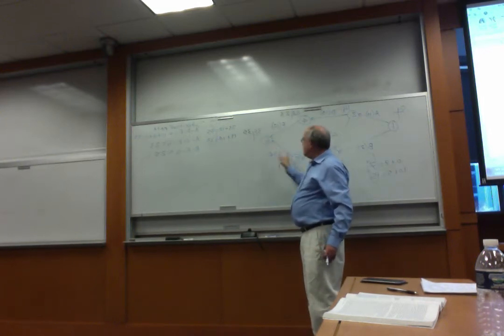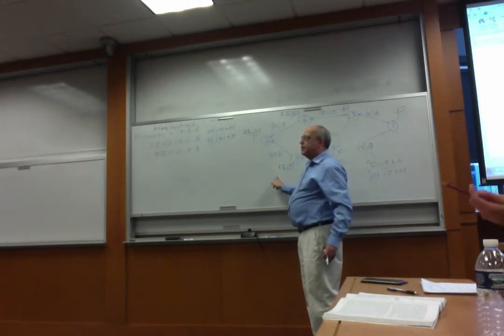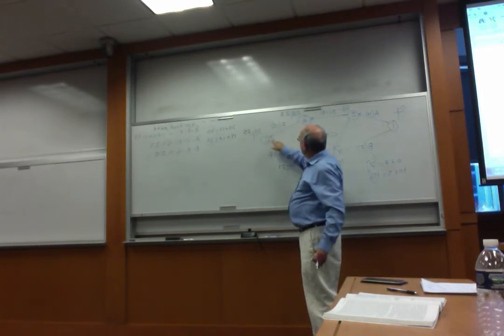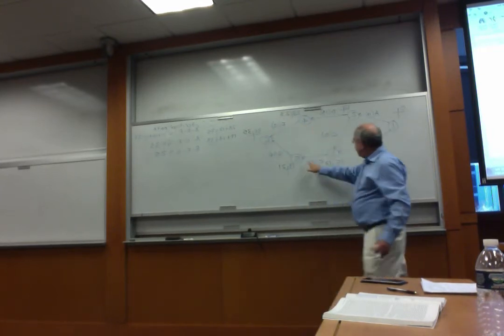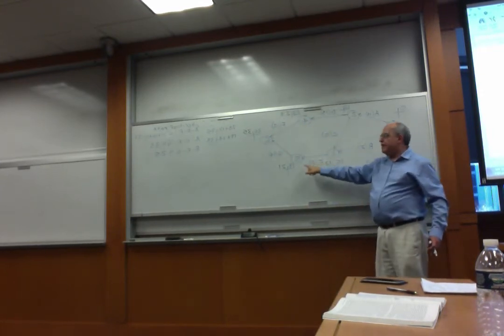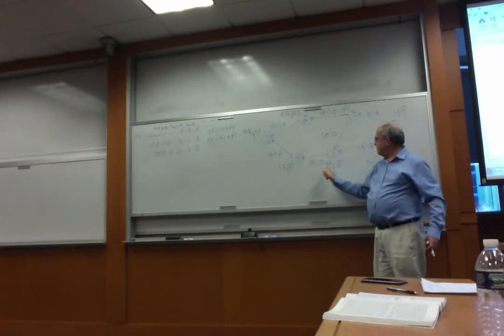How can we get from 6 to 5? Yes, 35 minus 14, 21. Can we go from 6 to 4? 35 minus 12, 23. The key is 3. Can we get to 3 going backwards? Yes, 21 minus 4, 17.